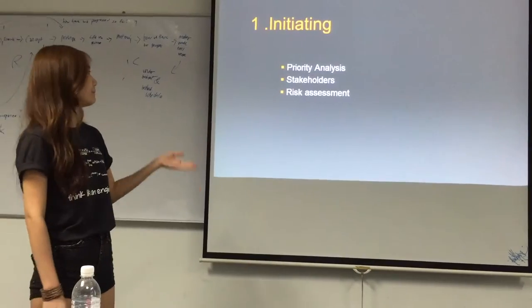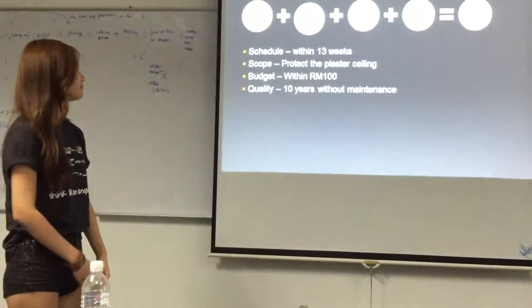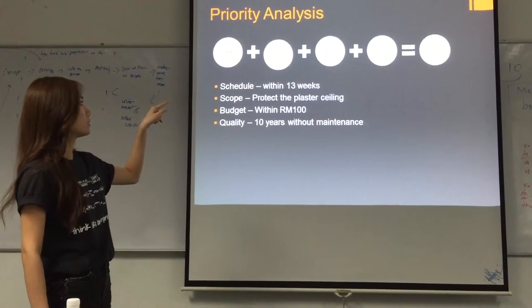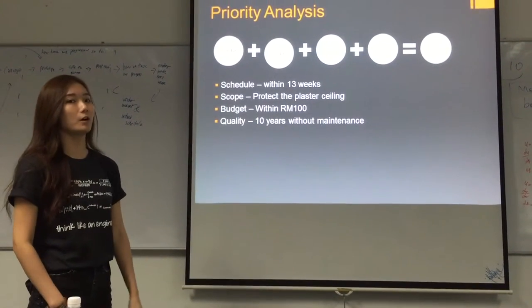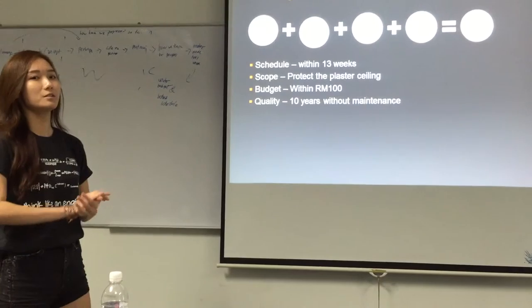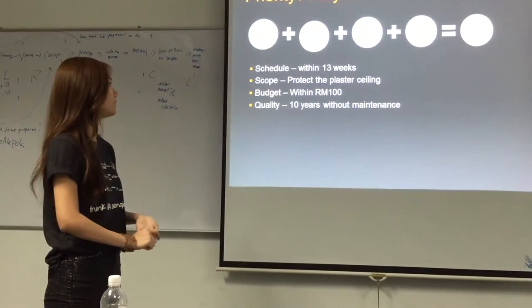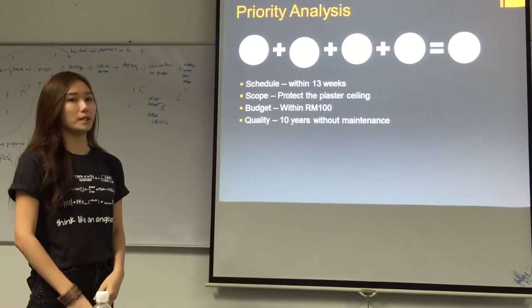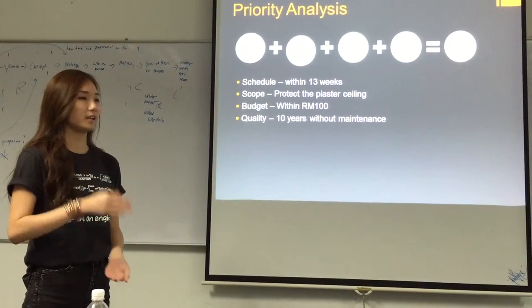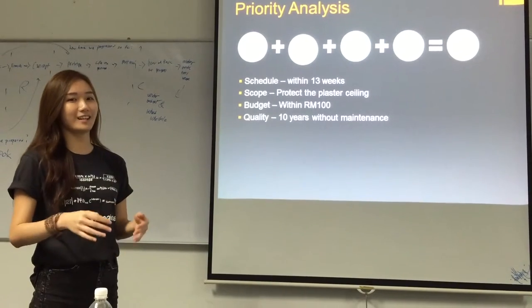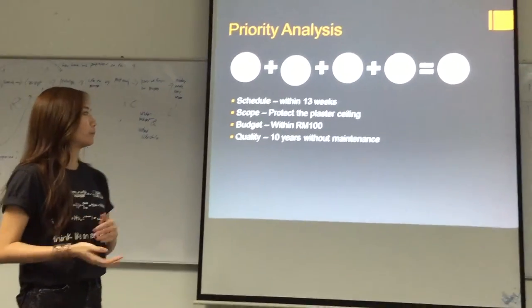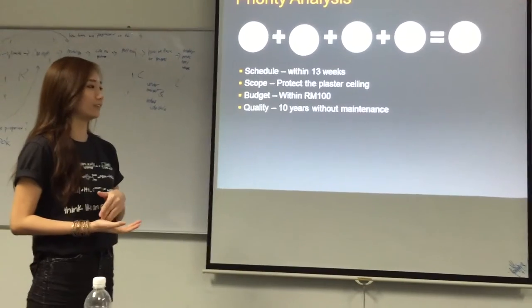Under initiating, there are priority analysis, stakeholders, and risk assessment. The project consists of four priority aspects: schedule, scope, quality, and budget. For our schedule, we plan to finish our project within 13 weeks. Our scope is to protect the plaster ceiling, which is our main objective. For budget, we catered our budget to be within 100 ringgit. For our quality, our product can be maintained for 10 years without maintenance.